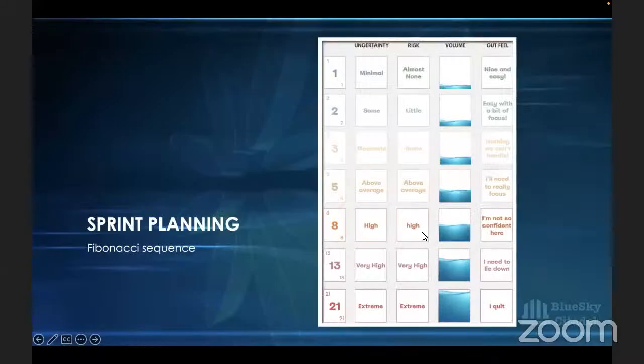At this point, you can decide as a Scrum Master to let them know that, okay, let's divide this product backlog item and split it into two. So at this point, the product backlog item can be divided and moved to another sprint, or they could just commit that product backlog item again entirely in the current sprint.